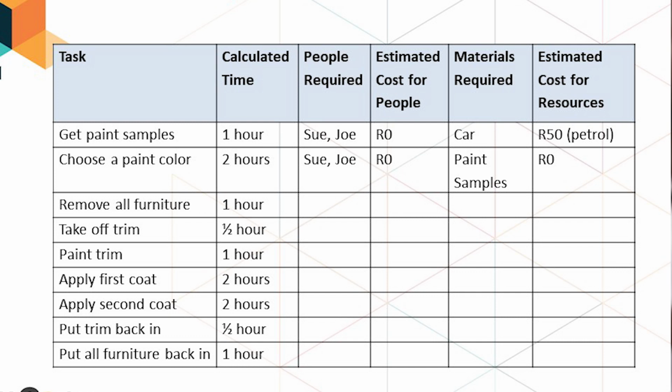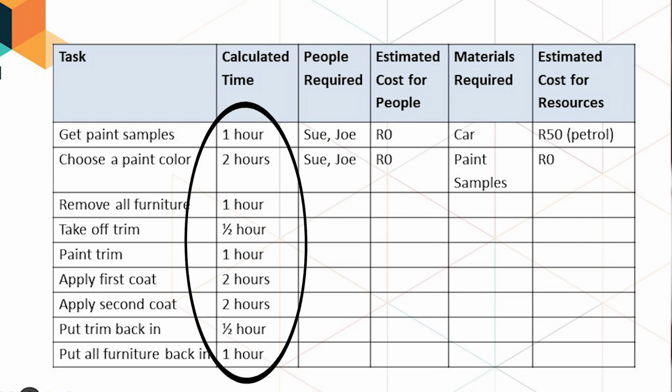Okay, so it starts with you making a list of all tasks that are going to be done, and how detailed you are when it comes to the task list is totally up to you. Write the task list in a way that you will accomplish it. The next thing you do is estimate how much time you will need to execute each task. Time can be listed in minutes, hours, days, weeks, months, or years, depending on the project. But you should keep the same time scale for each task.